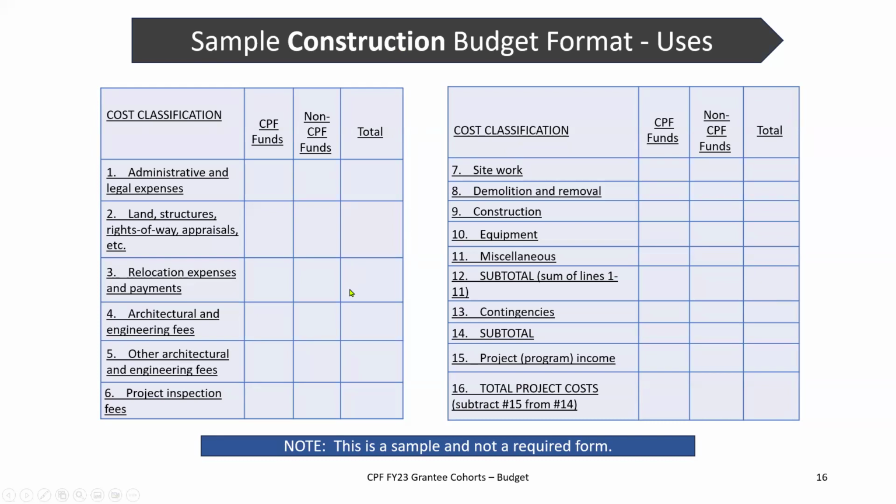So again, sample budget, sample line items, you don't have to use it, but you do have to identify separately the CPF funds and the non-CPF funds, and the budget has to be for the entire project, all uses for the entire project.